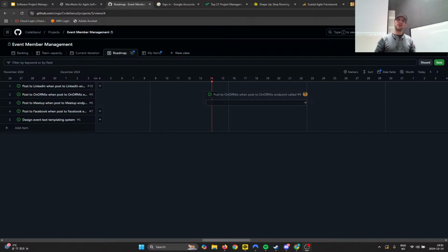So depending on whom you ask, that's not necessarily the wrong way to do things. Having bug fixes be part of the sprint, there are ways of doing Scrum where that's a thing. Jira, for example, when you create a Scrum project, there's no story points for bugs, which is weird. That drives me mad. I think it's assumed that ideally you would catch the bug in the same sprint, and it would effectively be part of the work of implementing that feature. I don't know if I necessarily agree with that,